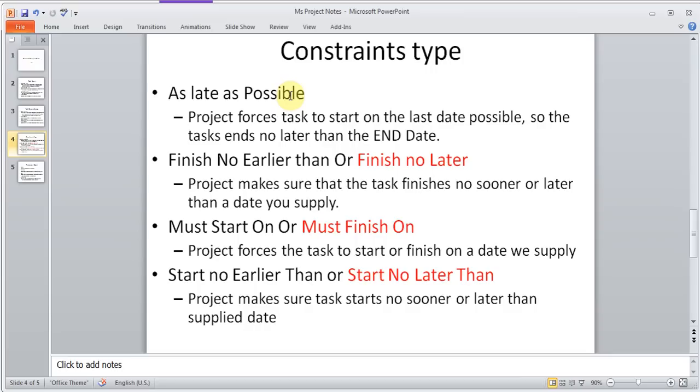So if I choose that constraint, as late as possible, and I choose a date, that means it will wait till the last moment to start the task to do it. And then there is finish no earlier than, so that the project will make sure that the task finishes no sooner than the date you apply, or finish no later than, that is project will make sure that the task finishes no later than the date you have supplied. And then the must start on, or must finish on.